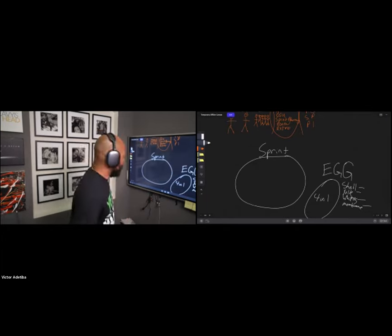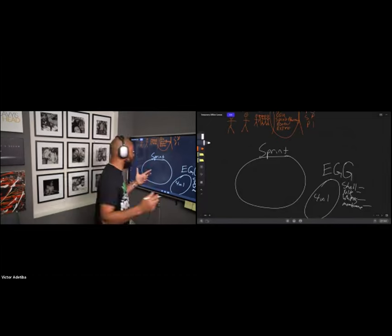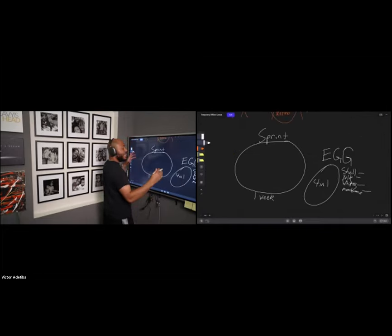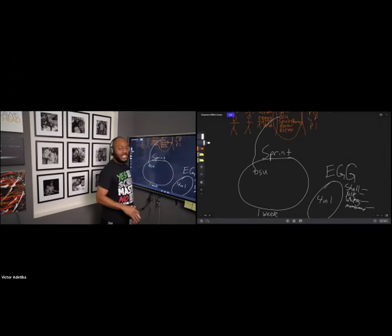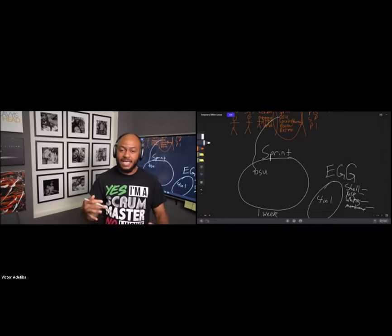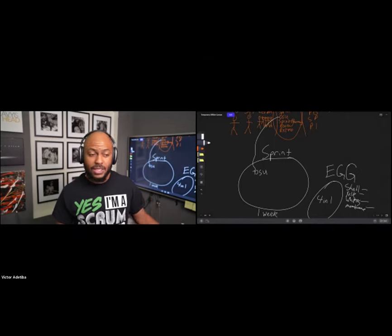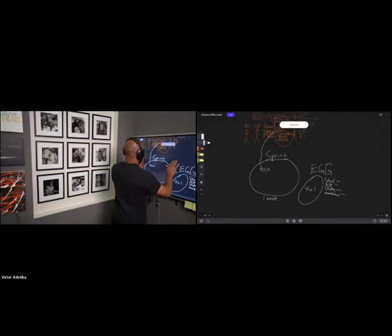Five in one — because within the confines of this sprint, in our program we've got one-week sprints. Within the sprint, the other things that happen include the daily standup. The daily standup is a 15-minute time-boxed event that happens every day of the sprint. It's an opportunity for the development team to collaborate and talk about progress towards the sprint goal — everything they've committed to in the sprint backlog.